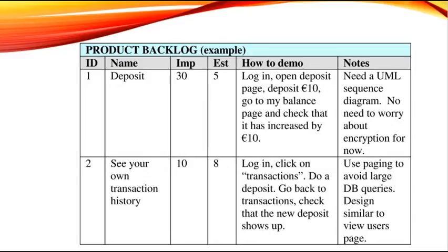Clear enough so that developers and the product owner understand approximately what we are talking about, and clear enough to distinguish it from other stories. Normally 2-10 words. Importance. The product owner's importance rating for this story. For example, 10 or 150. The higher the number, the more important.